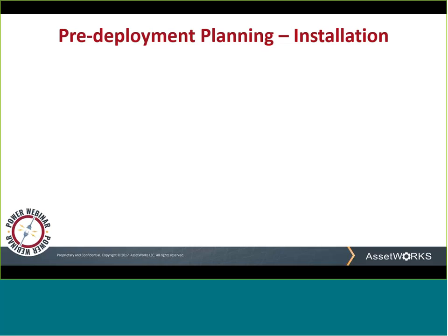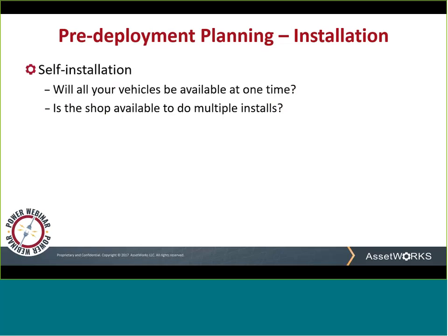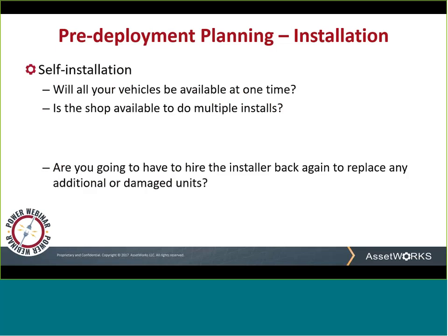There are a couple of options to choose from when installing hardware. First is self-installation. If the plan is to install the hardware yourself, you need to look at if that is feasible. Will all your vehicles be available at one time? Is the shop available to do multiple installs? ELD installs, if the installer knows what they're doing, typically take 45 minutes to an hour per vehicle to install.